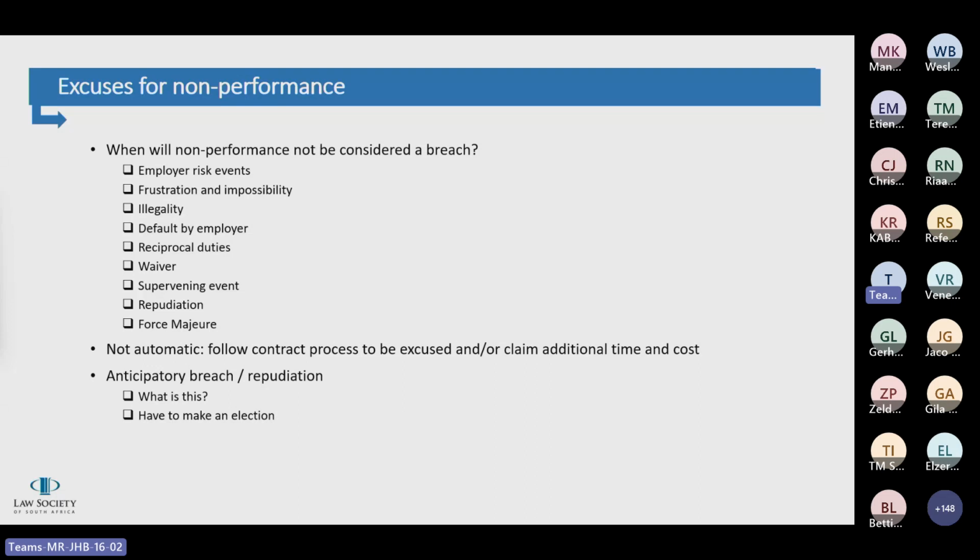Some contracts deal with specific remedies for specific defaults by a party, and these provisions will override the common law and will then be the remedy available to an innocent party for default. As an example, FIDIC contracts entitle the contractor to suspend work or reduce its rate of work where payment is not received. However, it is subject to certain notice provisions.